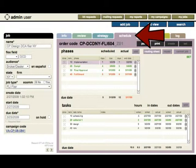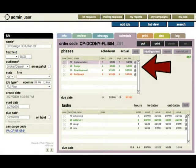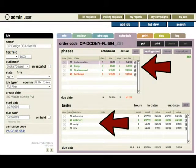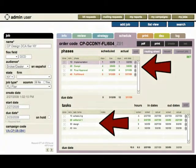You can see that the schedule is broken down into phases and subsequent tasks. When a user clicks on a phase in the top phase list, then its related tasks will appear in the bottom list. We also have some conditional formatting to show when phases or tasks are ahead of schedule, indicated by green, or when they're behind schedule, indicated by red.